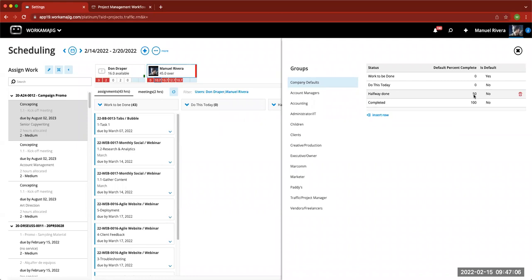Otherwise, we want to just let you know that you can still run your time entries, and we want you to. And so you may not need to set those to anything but 0, except for the one status that shows that the assignment is complete. Then by default, if you're using time entries and you're setting that task to be completed, it's going to turn 100% anyways. So just being aware that there's that feature here that you're welcome to try out or use, but it's mostly zeros and 100. I just do this for those users or teams that only use the percentage complete. If they want to give other feedback, this is how they can set it that way.